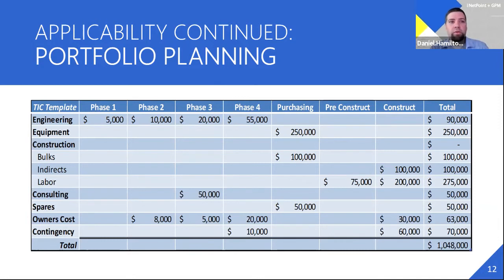So I do have to say portfolio planning was a learning curve, and it's a whole different process from just typical EPC planning. So this is a process where customers and clients present us with all their projects over a period of time. And we go through a process of taking each project, resource loading them with dollars or hours or both. After that, we sit down with the customer and plan their projects and level their projects using NetPoint. When we move the projects in NetPoint, we can see the histogram, which is showing dollars or hours, start to level out. And this is becoming a standard practice within Worley.